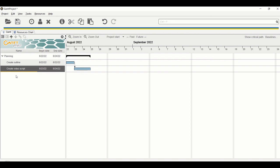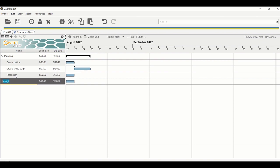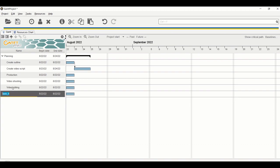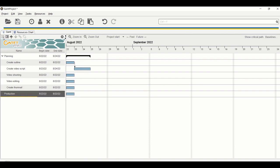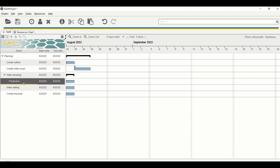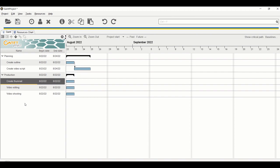The planning phase is done. Now let's add tasks for the production phase. Press Ctrl+T and add 'Production' as a category. Under it, add 'Video Shooting', 'Video Editing', and 'Create Thumbnail' using Ctrl+T. Then promote 'Production' to be a parent category, and demote the three tasks under it.